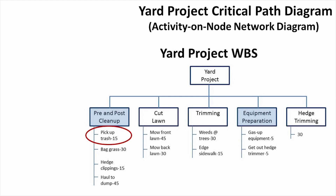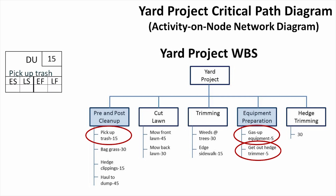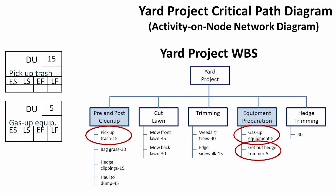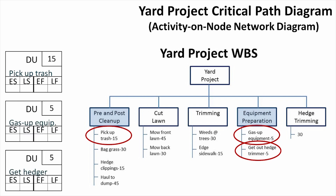We see that we've got to pick up the trash first, we've also got to gas up our equipment, and then we need to get our hedge trimmer out. These are the first three tasks or subtasks that we can do, and we can do them in parallel. I list these side by side on my activity-on-node network diagram, and this is ultimately going to determine our critical path — so I've called this the critical path diagram.